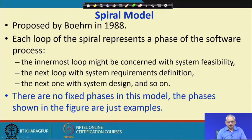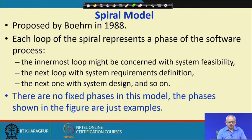Now let us look at the Spiral Model, which is a rather old model compared to the ones we just saw. It was proposed by Boehm in 1988 and has features of both incremental and evolutionary development. It is developed over several loops, similar to increments. The innermost loop may be concerned with system feasibility, the next with requirement definition, the next with system design, and so on.